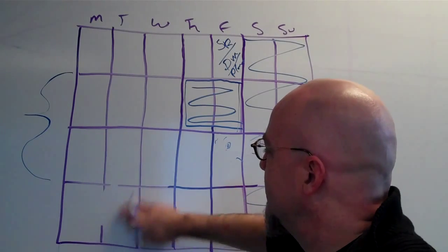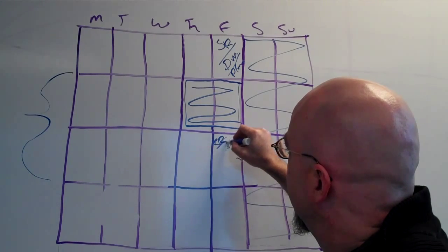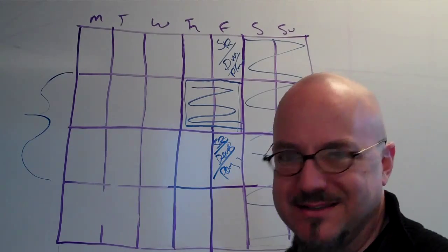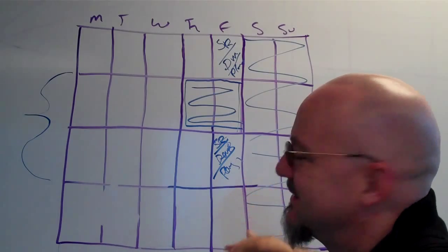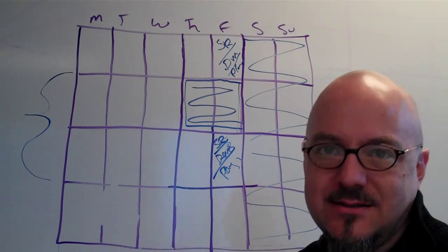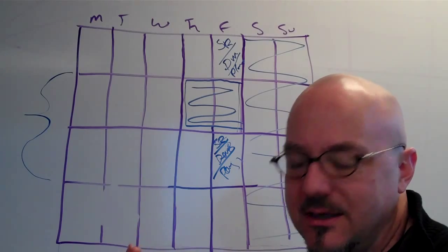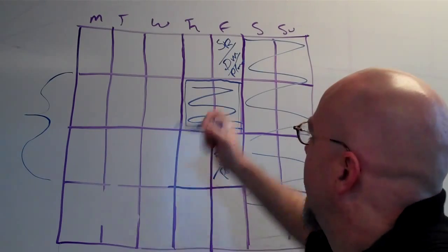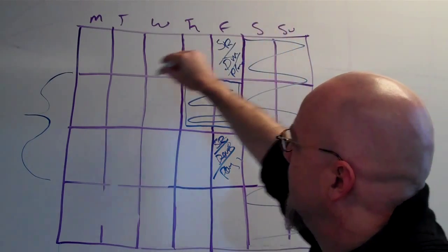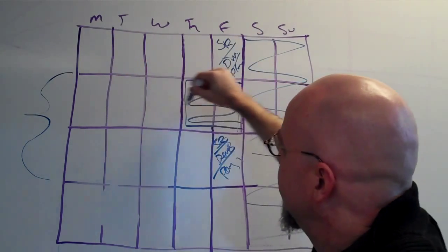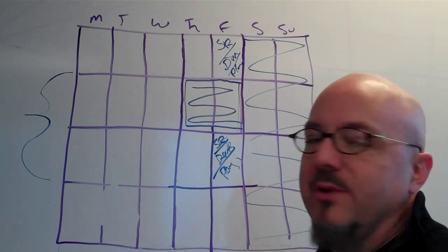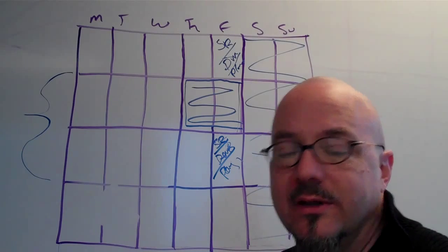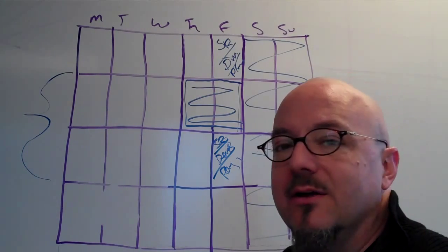So what I'm doing these days is I'm keeping the sprint review, demo, and planning all, horrible handwriting, isn't it, all on the same cadence. So you maintain that cadence. That's the word we use in Agile for the rhythm that we have in the cycles of our project, so that we know here's where we do our sprint review, demo, and planning, then we develop, and then we do sprint review, demo, and planning. And yes, your velocity is going to get screwed up. Oh well, live with it. The fact of the matter is, you can live with it.